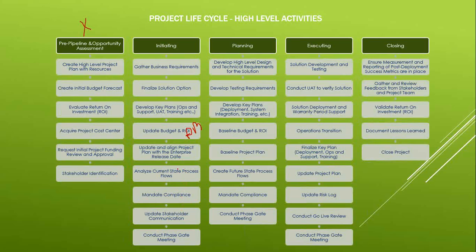All these things you do as part of the requirement gathering process, to see whether it is a mandate or not. If any stakeholder needs to be involved as part of the requirement, all that communication comes under your requirement gathering process. Once you do all these things, you have a gate review for the funding approval, then you move on to the planning phase.